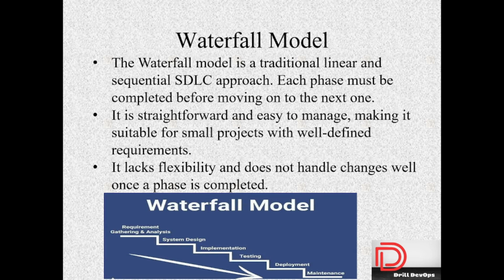So if you see in the waterfall model, you are doing it one by one, where when someone is working on one particular step, the other guys will be sitting idle. Like let's say if the product design team or product manager is working on the requirement gathering, the other teams will be sitting idle. They are waiting for those requirements to come. Once that is done, the system design team will start working on it. The other people will be sitting idle. So there is lack of coordination, lack of proper utilization of resources, and then there are time gaps and lags.